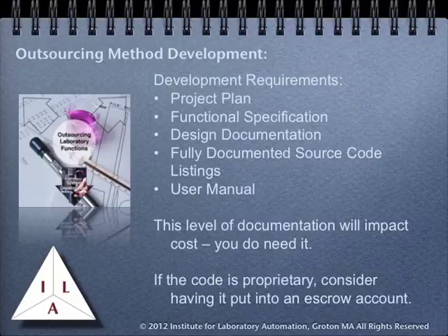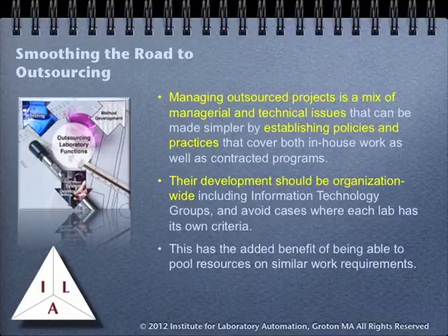If the vendor considers code a proprietary product, ask to have a copy put in escrow accounts to protect yourself against the vendor either going out of business or being purchased by another company. Managing outsourced projects is a mix of managerial and technical issues. The situation can be made much simpler by establishing corporate policies and practices that cover both in-house work as well as that work that is outsourced. This provides a clear set of rules that everyone has to follow when work is being done. It makes it easier to present a corporate policy to a vendor and ask them to follow them in your projects than have them feel that the rules are being made up for them and might be negotiable.